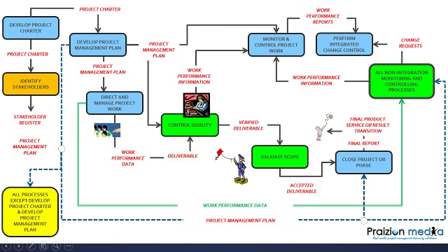Also, your quality objectives and the quality criteria that have been used to evaluate project success, ensuring that actual milestone dates were met, any reasons for variances throughout the project for those core milestones, and also the cost objectives. It all boils down at the end of the day to time, cost, scope, quality.